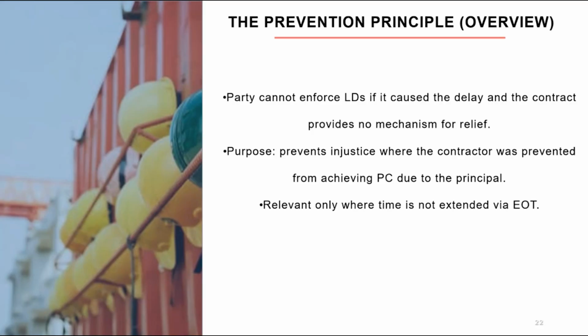So the purpose is to prevent injustice, where a contractor is prevented from achieving practical completion due to the principal's own default. And it's relevant only when the extension of time clause doesn't allow the principal to adjust the time for completion.